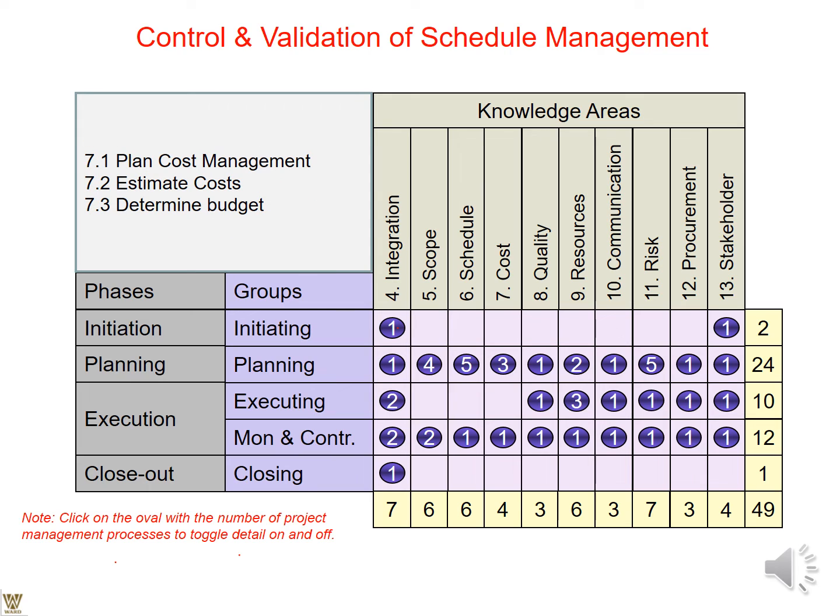costing. In the planning section of the cost, remember we are talking nothing but planning the cost and estimating the cost. If the project is of a longer duration, you have to estimate and integrate the inflationary pressures within the cost and thereby determine the budget.